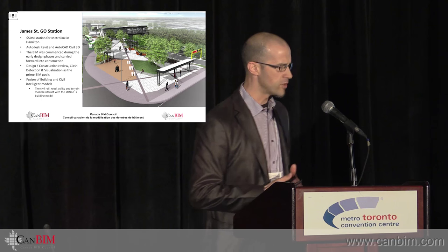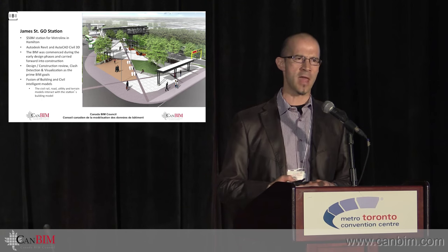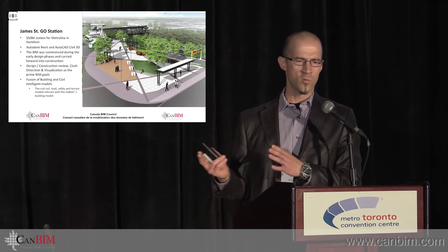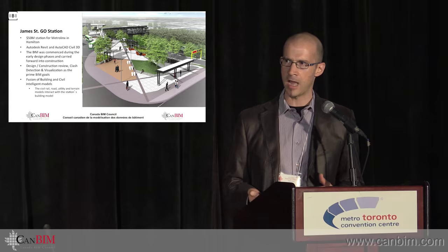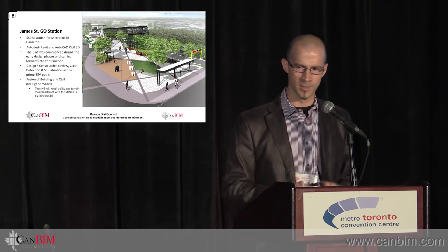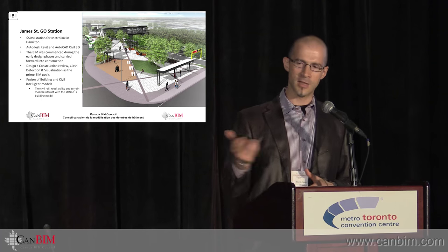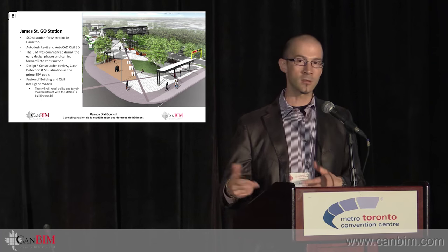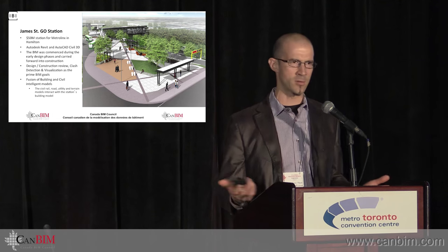I remember in a previous project, it showed me thousands of clashes where all the handrail was clashing with the concrete slab, because the handrail was embedded in the slab, and we didn't want to go and puncture the 2-inch holes all over the place. So, you know, some clashes are just ridiculous. But there's other clashes like structural against mechanical, mechanical against architectural. Find those ducts that are hitting those beams, automated reports, fix them.